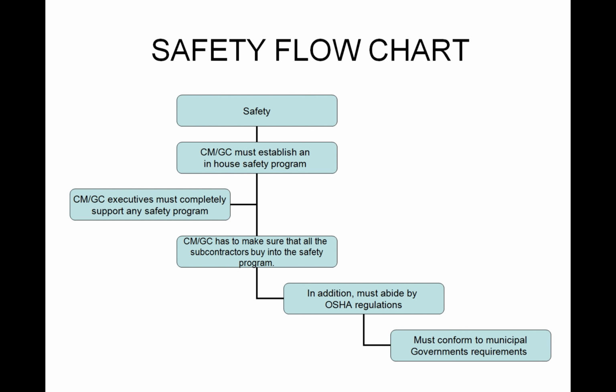Now, when you're a CM, you have to ensure that all of the subs that you bring onto this site will have the same emphasis on safety as you do. And generally, the way we like to do that is to have them sign up into your own safety program, that they will also abide by the same stuff that you have in your corporate program. And you can make that a condition of the contract. And if they don't want to do that, then you can go to another subcontractor. So generally, the subcontractors are willing to buy in and take all the steps necessary to meet your own safety program. And that way, you know what's expected of every contractor.